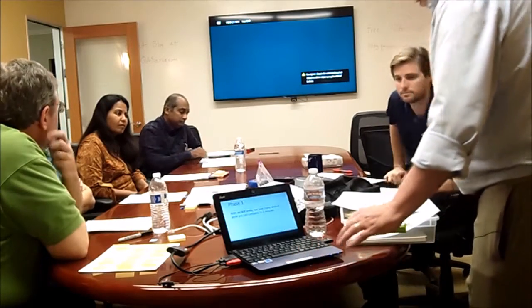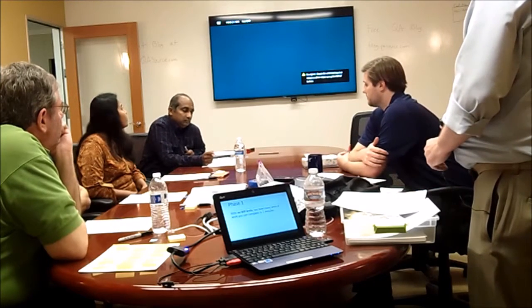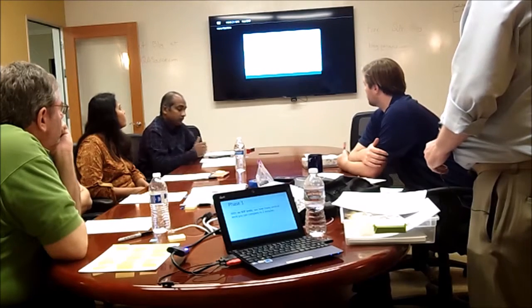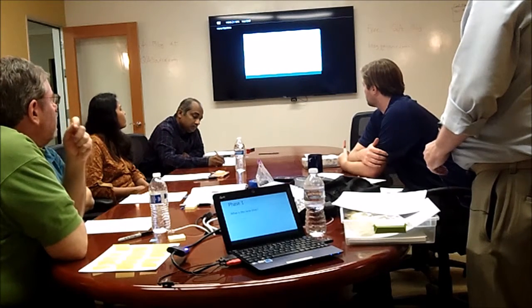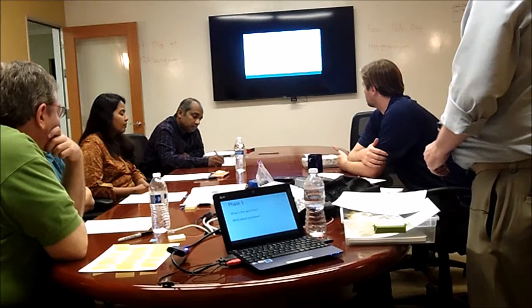Okay. All right? So let's talk just for a moment about what's going on here. Obviously you recognize this operation as the bottleneck operation, right? And you realize that this is the throttle. This is the speed that limits the whole system, regardless of what kind of system it is. If it's got dependent operations that are chained together like this, the bottleneck rules. Most important person in the organization. Okay. We've got the cycle time, and we're skipping the lead time on this one just for right now.